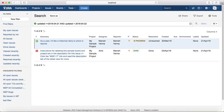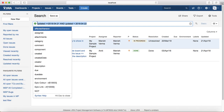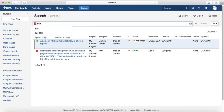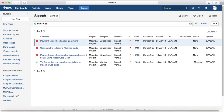Another example: you want to see issues due within the next two days. Since next two days is in the future, that will be a positive number. The query is due less than or equal to +2d, and it will list the issues that are due in the next two days.